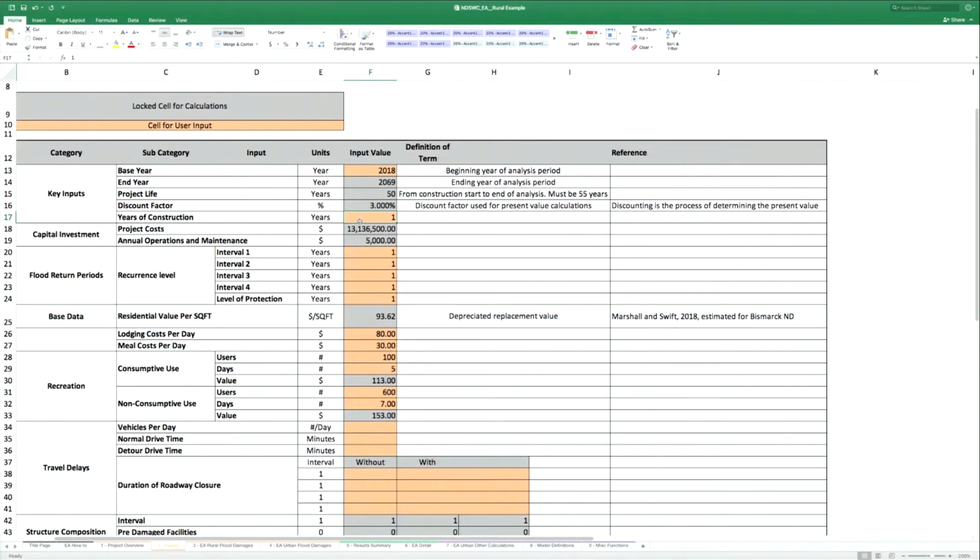And again, calling it permanent protection, yes, the levee might be in place permanently, but that doesn't necessarily mean there won't be things that occur over the life of the project to either keep it operational or to maintain that level of protection. I think you answered the question to begin with: any benefits beyond 50 years are discounted, so they may only add 3-4% to the total present value of the benefits. And if you need those 3 or 4% to get over 1, it's a risky project to start with. Yeah. So the first and fullest answer is they're discounted beyond 50 years, so they aren't going to do much for you.